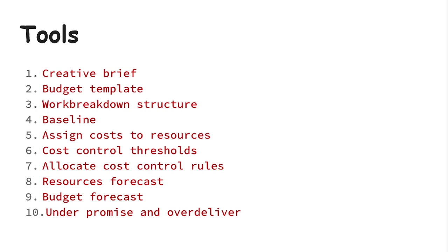If you see my project budget template, when you're budgeting you have the resources, the person assigned to a particular task or activity, and then you have the time. That's what your work breakdown structure helps you achieve. So you know that this person is assigned this resource, and on this task they are going to spend maybe $1,000 and do the task in 3 days. So it also helps you assign your responsibilities clearly and manage and monitor your budget.